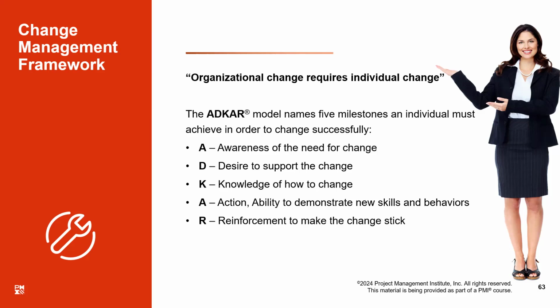A, D, and K, awareness, desire, and knowledge, must have happened before the start of the project. It could have occurred before, when we were doing the business analysis, when we were trying to convince our bosses that this change can be brought, this new project can be started. So we were doing awareness, cultivating the desire, and providing them the knowledge. And when they agree, that is the time when the project starts, and that is action time.